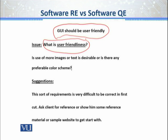This is a big exception — we cannot expect that everyone will automatically agree. The core reason is: what does the client actually want? More images? More text? Is the focus on color scheme? This is not the fault of the QA team, the developer, or the software architect. The burden lies with the project manager or whoever is doing the business requirement gathering — the business analyst. It is their blunder that while gathering requirements, they left a huge open area by simply passing on: 'I need a user friendly website or GUI.'